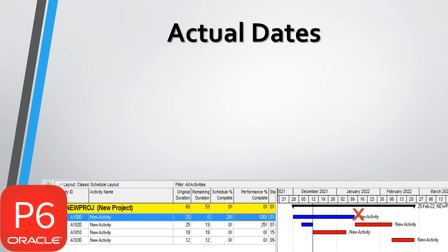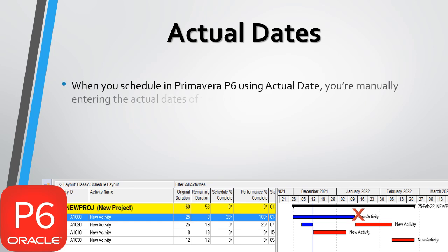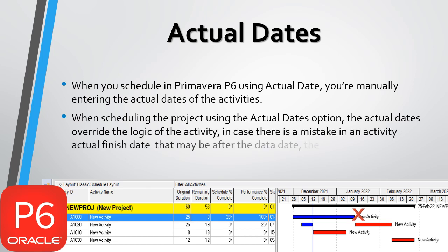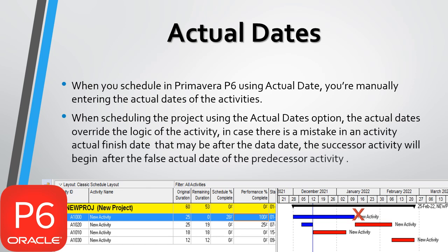Actual Dates: when you schedule in Primavera P6 using Actual Dates, you are manually entering the actual dates of the activities. When scheduling the project using the Actual Dates option, the actual dates override the logic of the activity. In case there is a mistake in an activity's actual finish date that may be after the data date, the successor activity will begin after the false actual date of the predecessor activity.